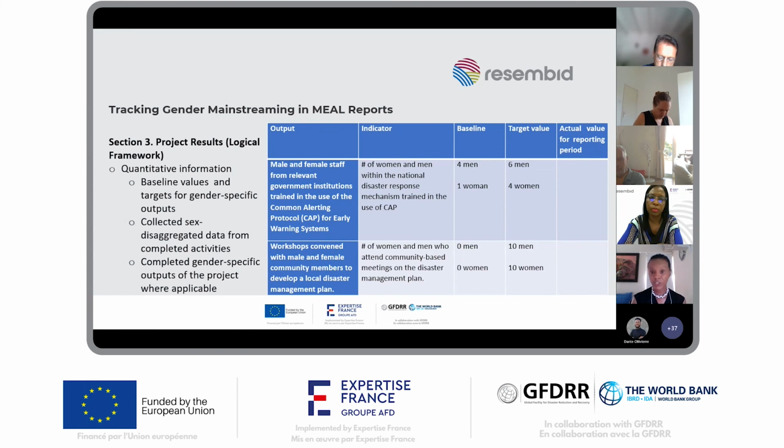Maybe you do not have it gender-specific. And the example I've used here in the first instance, where the output is male and female staff from relevant government institutions trained in the use of the Common Alerting Protocol, or CAP, for early warning systems. And the indicator then would be the number of women and number of men within the National Disaster Response Mechanism trained in the use of CAP. And your baseline here is not 0, it's 4 men and 1 woman. In this hypothetical example, 4 men and 1 woman have already been trained in CAP.